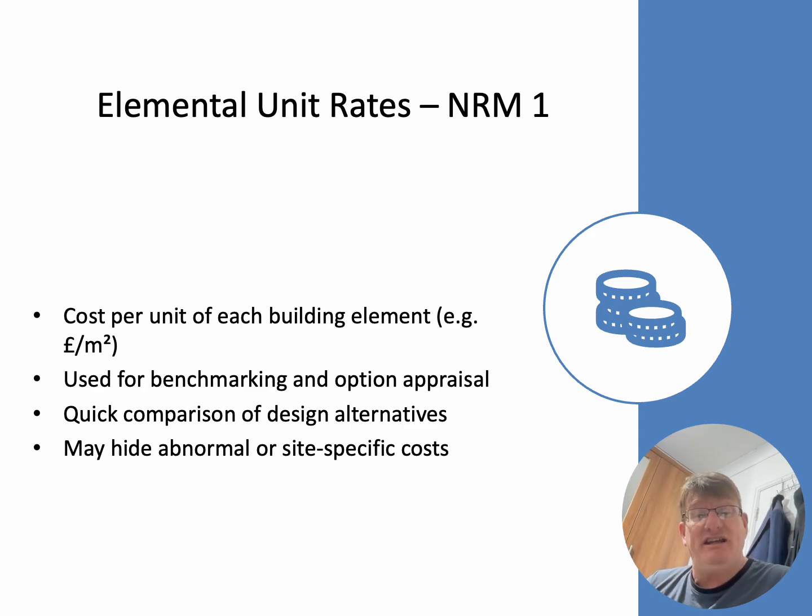Used for benchmarking and optional appraisal. So again, coming up with different options. Okay. Quick comparison of design alternatives. That's the beauty of it. It's fairly quick. It's fairly accurate. May hide abnormal or site-specific costs. That's the trouble. It's too generalized. So there's your problem. Based on historical sort of data.